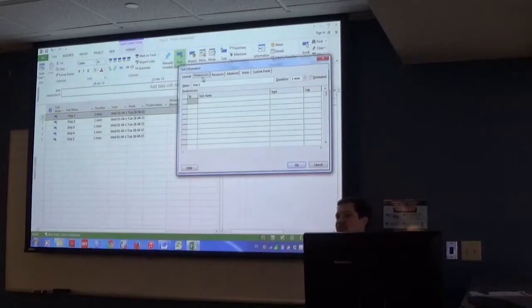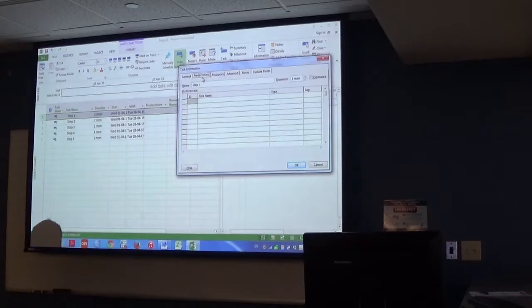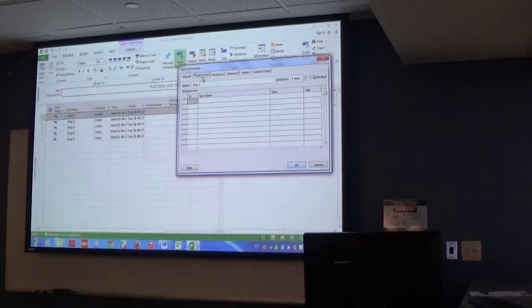But when we get to the end, it's the critical path. And actually, we're going to just watch a video on critical path because I'm not the best at explaining it. But like I said, a foundation needs to be completed before you can build the superstructure, and the superstructure before the roof, and the roof before you could do drywall and put the windows in and start doing your internal stuff. So identifying the critical path and the things that have to happen before other things happen is the driving factor, what really makes this program different than something that's just a calendar.